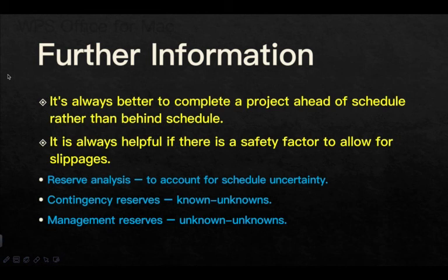It's always better to complete a project ahead of schedule rather than behind schedule. It is always helpful if there is a safety factor to allow for slippages. Reserve analysis to account for schedule uncertainty: contingency reserves for known unknowns, management reserves for unknown unknowns.